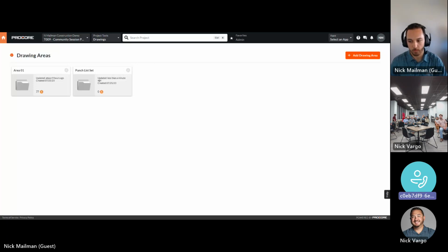What we created is just a PDF. We point out the defect in the drawing and put the simple name of the trade: okay, here is your defect. In that list we have around 10 subcontractors, and we distribute this paper to the workers. They can easily find that, okay, in this room, at this point, we have a defect, because they can see the defect on the drawing.